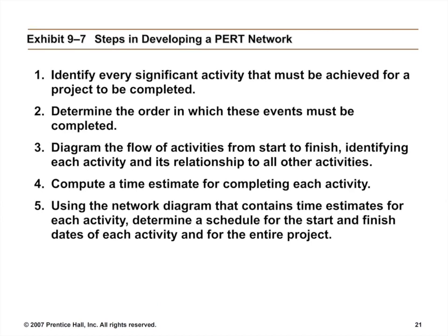How do we develop the PERT network? Firstly, we have to identify every significant activity that must be achieved for a project to be completed.